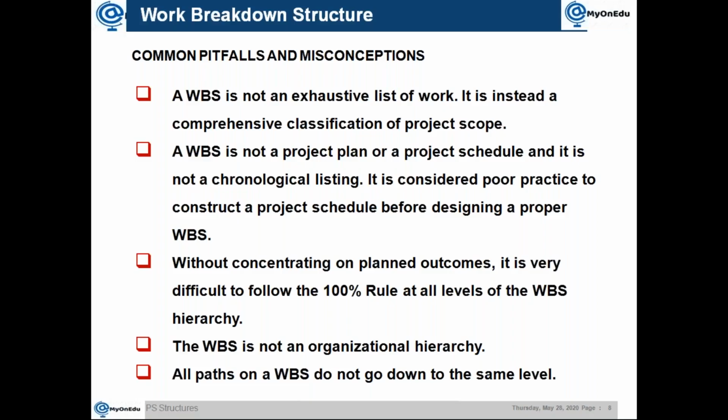So say a tendering guy or commercial guy is dominating a project, what he will do is always try to make the project structure based on his comfort. So obviously it will look like the bill of quantities. A total exhaustive list of work will come. This is from my experience I'm saying, because I have seen these kinds of issues and later on we have corrected it.